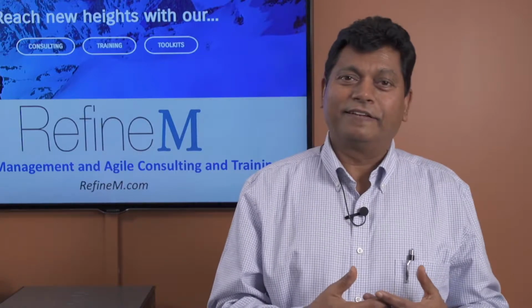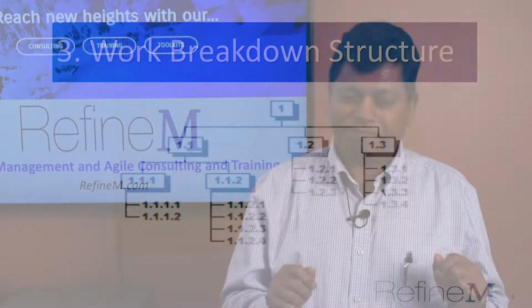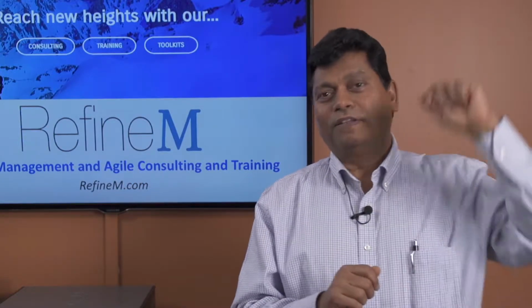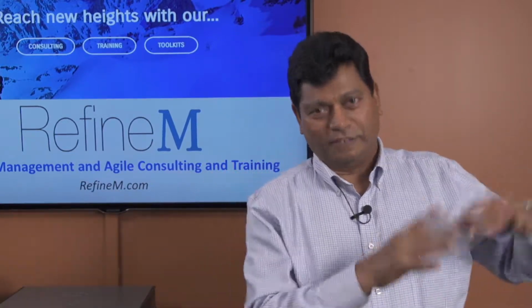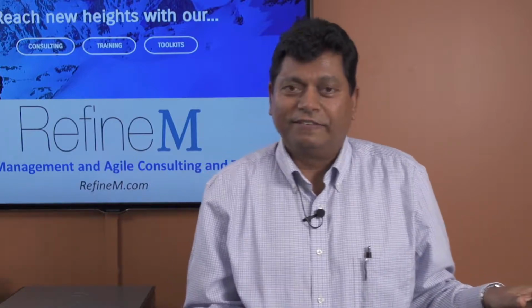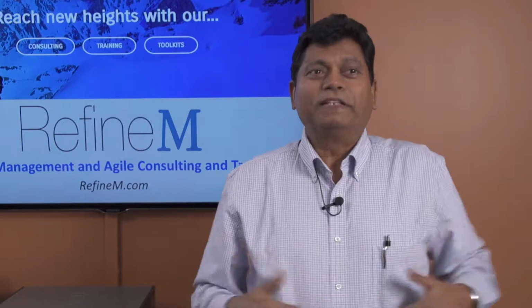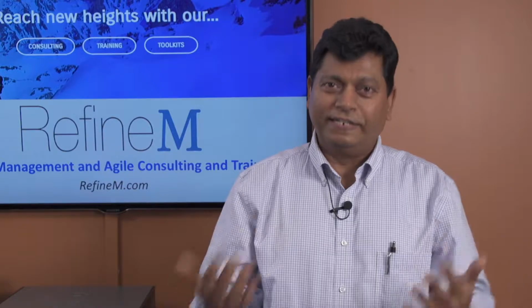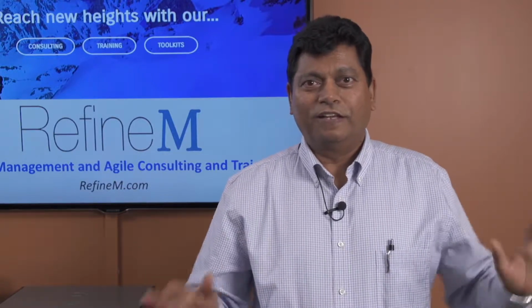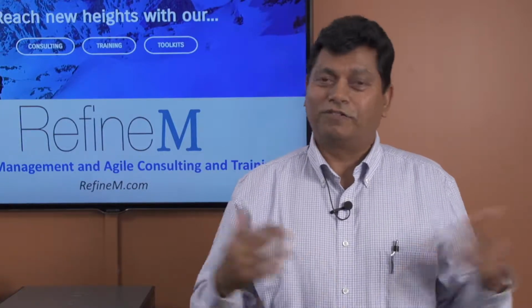The third is creating a work breakdown structure for all the work that needs to be carried out, starting from the deliverable and breaking the deliverable into sub-deliverables, into packages, into activities. That whole thing, the WBS, defines the scope, brings clarity about the scope. This can also be used to identify and manage changes. So WBS is a great tool to document the scope and also manage the scope.